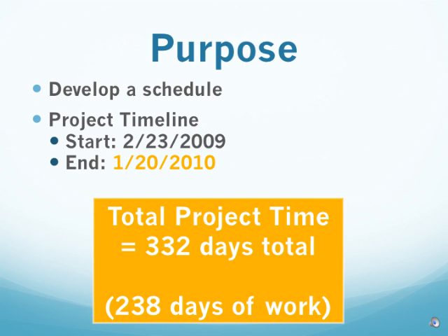The healthcare facility we are looking at has 7 departments that need EHR implementation. Some departments must wait for others before implementation can begin. After taking into account the interdependencies, the project was determined to take a total of 332 days, 238 days of work. I arbitrarily chose Monday, February 23rd, 2009 as the starting date. Therefore, the project is planned to finish January 20th, 2010.